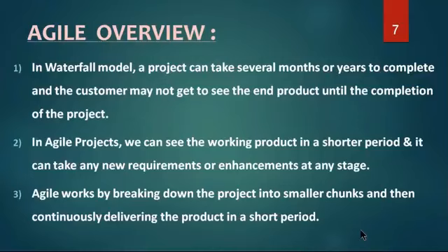product to the customer. In short, how often in agile, as per agile rules? Weekly once, or every 2 weeks, or 3 weeks, or 4 weeks, not beyond 4 weeks. It should not go beyond 4 weeks. That's the rule in agile.